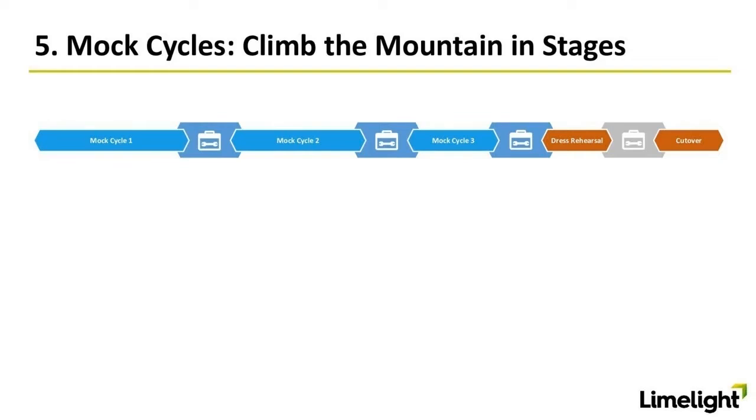One of the things you'll also see on the picture there is a little toolbox sitting in between each mock cycle. It is important to consider that when a mock cycle is run, we're moving data from A to B for the first time, perhaps. We're carrying out transformations, and we're learning things on the way. And we would strongly recommend ensuring that there's some mitigation window in between mock cycles. But as I mentioned, those mock cycles are building to typically shorter, fixed, inflexible windows.